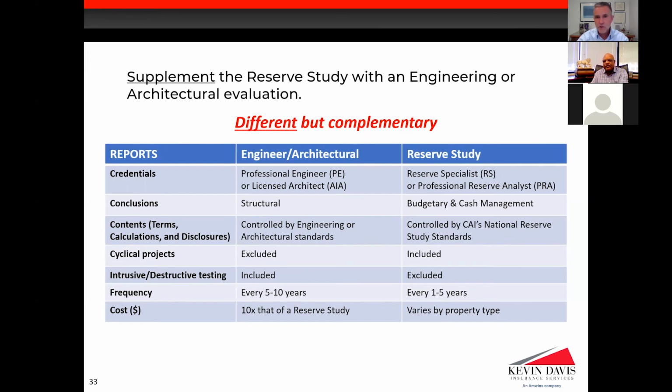First off, an engineering report is done with different credentials. A reserve study is prepared by someone with an RS or a PRA. The conclusions from an engineering report are structural. A reserve study is all budget and cash management. Do you have enough cash? Will you have enough cash in 3 years to do your boiler replacement? The contents are different. They're defined by different standards.